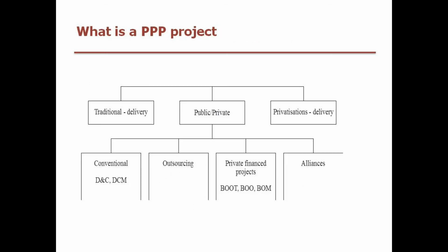If we consider the arrangement of a PPP project, the privately funded models can involve a variety of models, including BOOT, which is build, own, operate, transfer, and variations on that too, such as build, own, and transfer, or build, own, operate. They all involve the creation of the asset, the public getting the benefit of private sector financing, and long-term private sector ownership and control of the asset throughout the concession. So there's a long-term obligation associated with the PPP delivery.